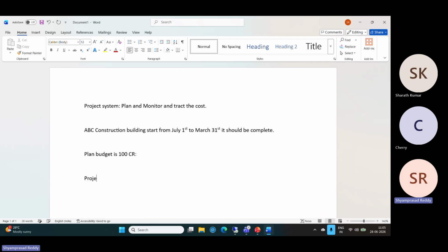In the project system, we will create the project. The project definition here would be the ABC construction project. And under that there are tasks, WBS elements. There is a floor number 1 WBS element. Here floor number 2. You can see floor number 1, floor number 2.